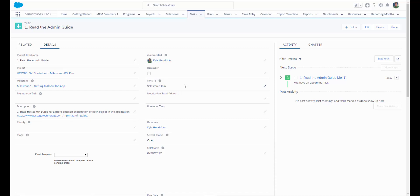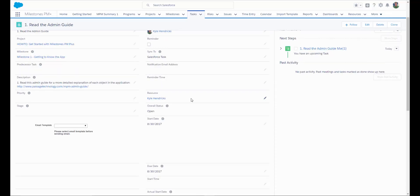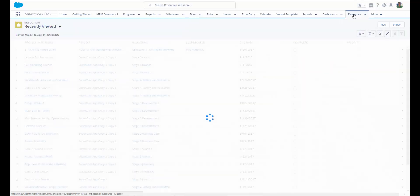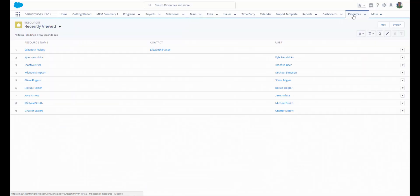Milestones PM Plus Premium Edition also comes with the ability to set up alerts and notifications. You can notify users. For instance, if a predecessor task is complete, it's time to begin the successor or a new task has been assigned to them. The resource that your project task is assigned to shows you who's accountable for the task. To add new resources, simply go to the Resource tab and click New.